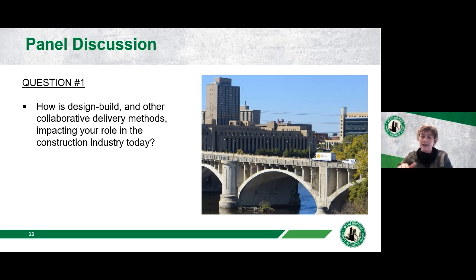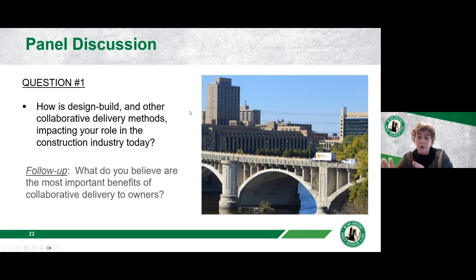You've got to truncate down the requirements, because if you put in a 50-page in-depth submittal package that's required for a $1 million construction value, that's going to turn off a lot of potentially really qualified companies that could provide a lot of value. So it's making sure to right-size your solicitations and the level of effort required for solicitation to the size of the overall construction project. But in terms of the actual getting the work done, I'd call that more of a progressive design build solution, where you're really looking for who's the key personnel, what's your approach, and what's your price, and then how are you addressing contingencies and risk, and cutting out a lot of the other complexities. It could absolutely be a great tool for you.